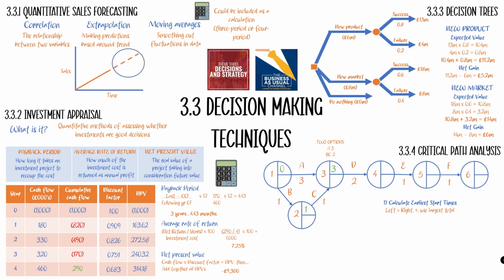And then the rest of this is going to be pretty straightforward because there's no multiples. But 3 plus 2 is 5. 5 plus 1 is 6. 6 plus 1 is 7. So what we've identified there is that this entire project takes 7 weeks. So you might have a deadline for this. It might be the deadline was 8 weeks, in which case we're great. If the deadline was 5 weeks, we're in a bit of trouble here.